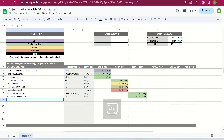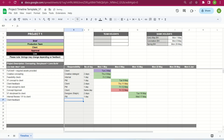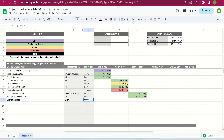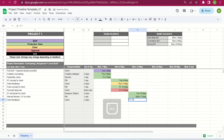After sending V1 of the storyboard to the client, we want the client to feedback — ideally they love it with just a few minor changes. For this example we'll hope the feedback is minimal. Client feedback is the responsibility of the client and we give them two days, which takes us to Friday the 19th of May. We can highlight this yellow.